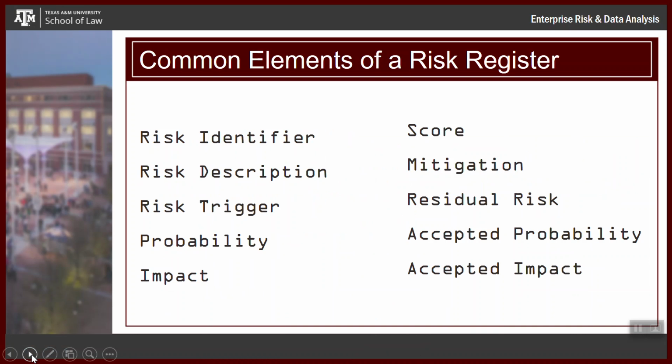We're not sure what the probability of certain events could be, so we might create a probability on a distribution, or we might assign it, as I talked about in the last lecture, and just say, look, we're going to give it this probability. The impact: if you get one thing out of this class, never consider risk without considering the impact. People tend to say, oh, this could happen, this could happen. Okay, stop. What would the impact be? Because if you don't have visibility into what the impact is, it's very hard to determine some plan of action for either accepting, avoiding, transferring, or mitigating that risk.